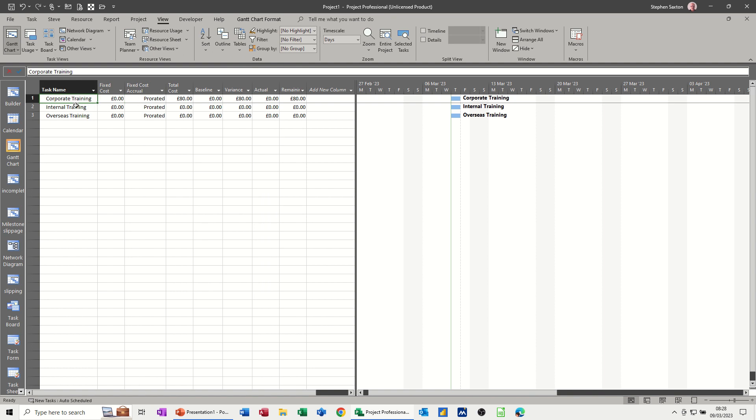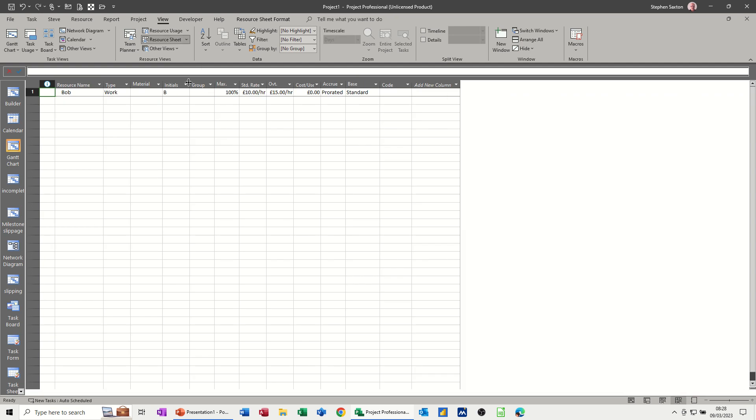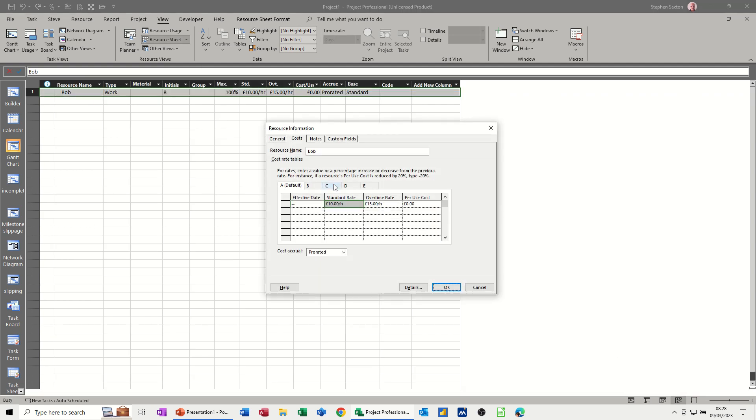Now if corporate training is charged at a higher rate than its basic, you can change that to be a separate cost table. So if I go back to the resources and double click back into Bob and click on B, I might say, if I use cost table B, it's going to be £20 and £25 overtime.